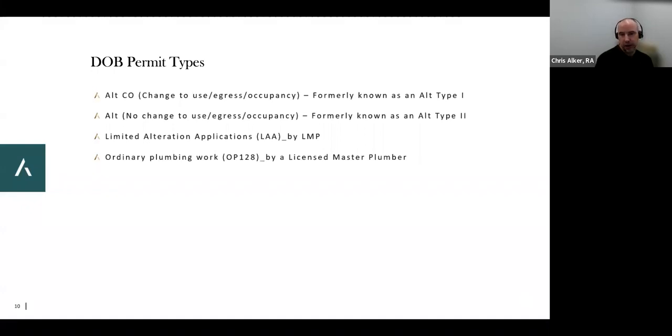The limited alteration application we talked about is the permit that you would be pulling if you're replacing your gas stove alone, and the gas stove replacement is not under the umbrella of a bigger alteration. And then there's ordinary plumbing work, which is an OP-128, which is, I'm going to swap out my toilet, for example. You don't actually need a full